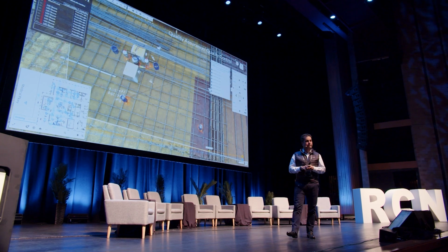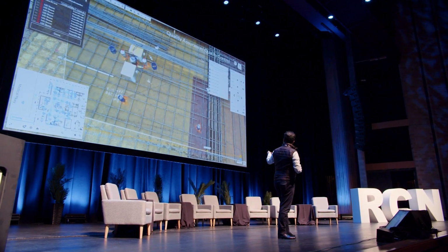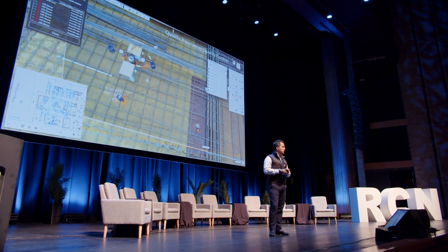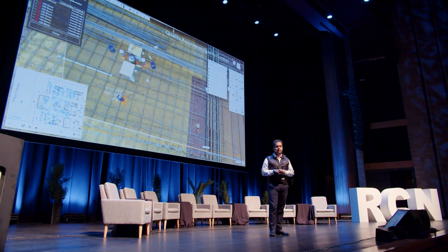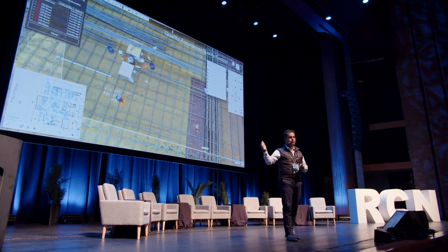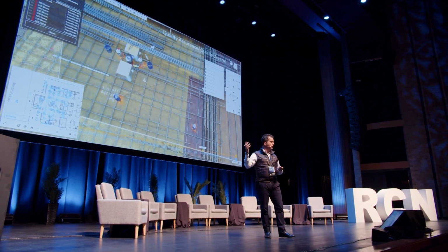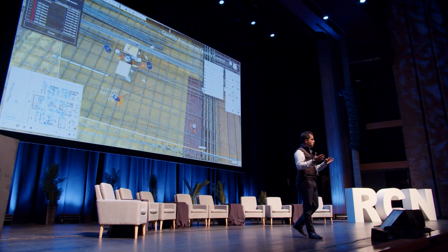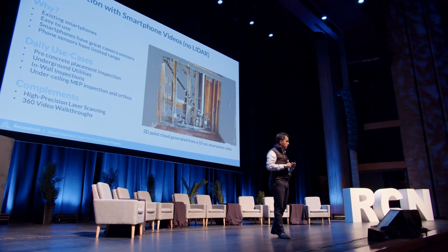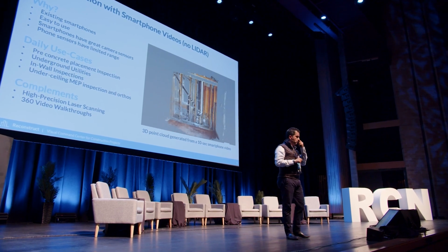Even if it's off by half an inch, it can immediately bring your attention to areas of issue. On the screen, you can see the sleeves deviated against the design. Now, this is a healthcare facility. Each sleeve would cost you around $1,500 these days, and maybe, drilling through concrete, another $10,000 penalty. Right here, we're looking at a $17,000 quality item, right? A rework item that can be caught because of high-frequency capture. So you're no longer just limited to your laser scan capture, and you can complement it. Now, given the popularity of this feature, we decided to also extend it to smartphone videos.